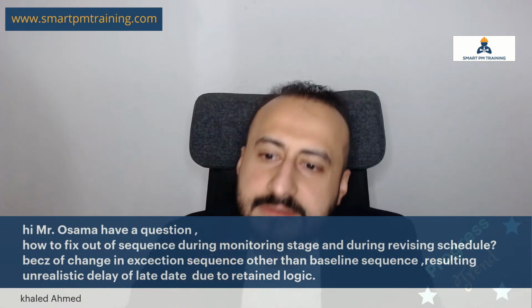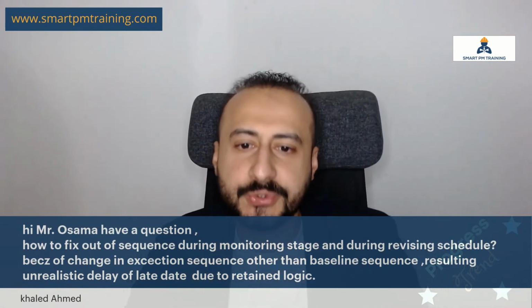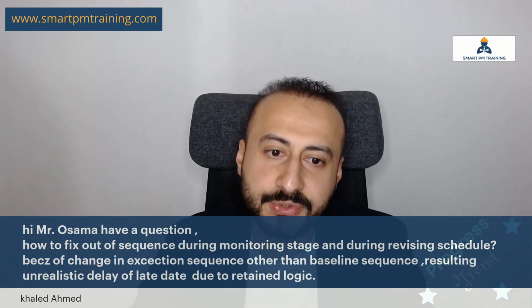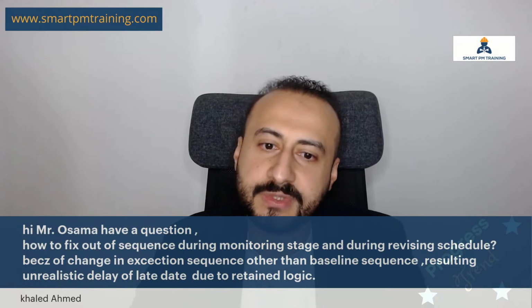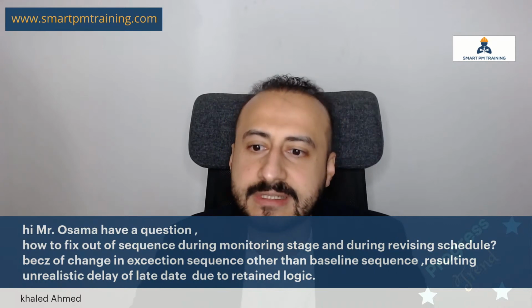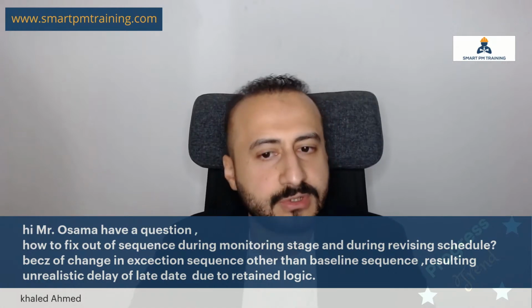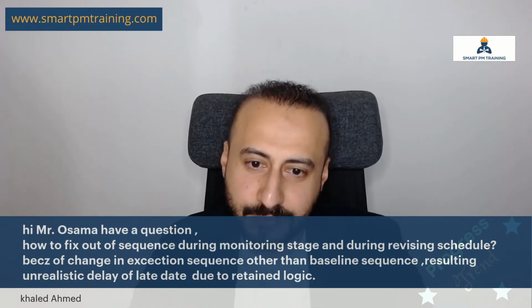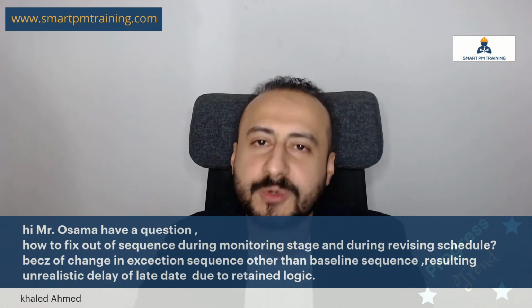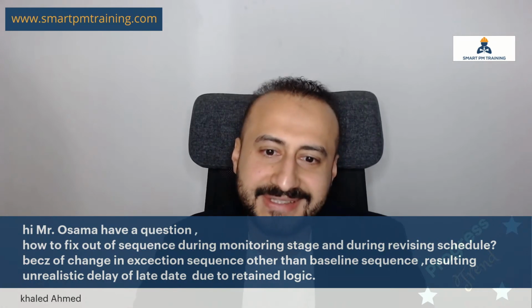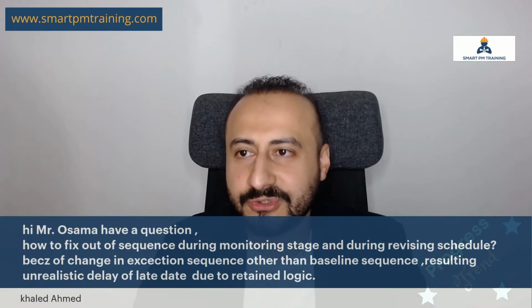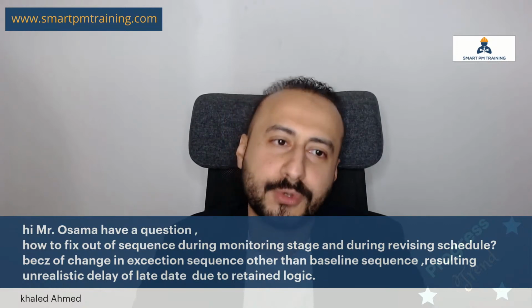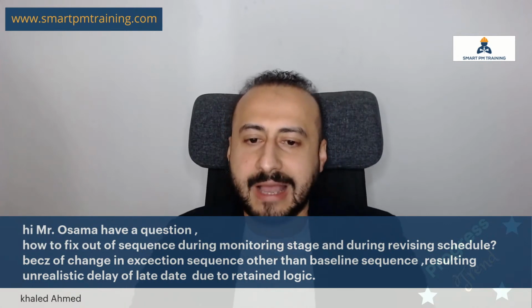From Khalid, how to fix out of sequence during the monitoring stage and during revising schedule. Because of a change in execution sequence other than baseline sequence, resulting unrealistic delay of late date due to retained logic. So first of all, if you have out of sequence, retained logic is not probably the reason. Retained logic is innocent from this accusation.